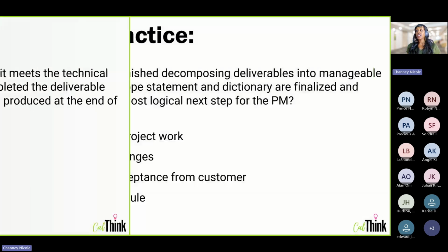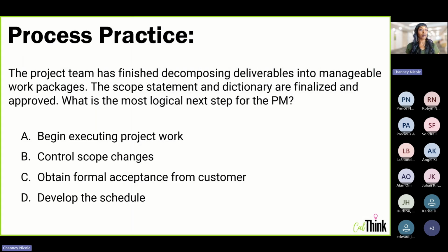All right, and then last question here. This one talked about decomposing deliverables into work packages. What's the most logical next step for the PM? The correct answer is going to be develop the schedule. And I see a few questions coming in, so let me pause and answer those before I go over this last one.